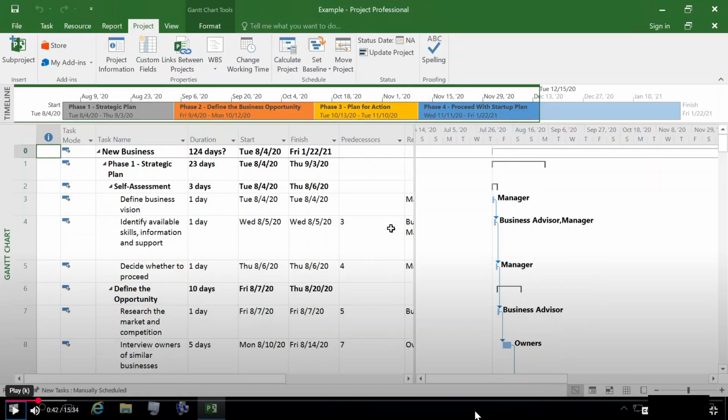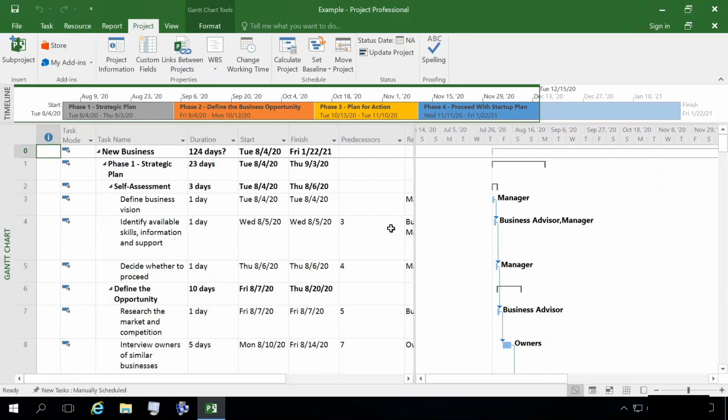This is topic C on page 33, assigning a project calendar. When you create a new project plan, Microsoft Project assumes that your project tasks will be performed during a standard work week. In reality, however, your project tasks may be performed during a longer or shorter work week. You may also have to take into account holidays and vacation schedules. In this topic, you will modify the project calendars in Microsoft Project so that they reflect the realities of your particular project.